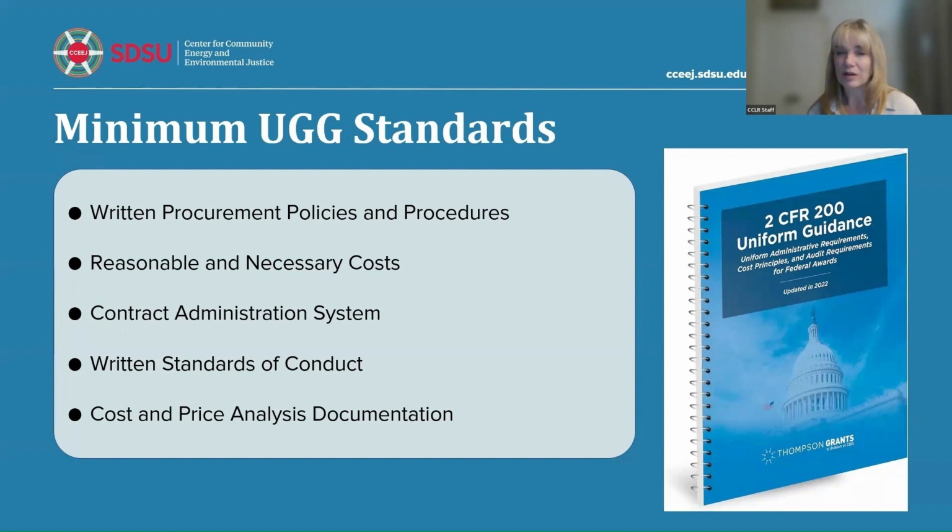So if you just bought one last year, is the payloader really necessary? Okay, and it has to be reasonable. So you can pretty much figure out what reasonableness is. If your payloader is 400,000, but you did a little research and saw that the typical payloader is 150,000, that wouldn't necessarily be reasonable. If you got audited and somebody saw that, they would probably question that purchase.